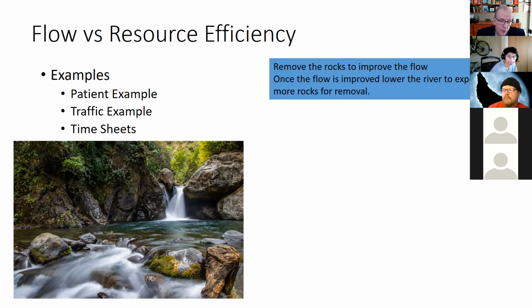That's one of the good things going to Last Planner system: you have the people that know their work and you are trying to engage them and you want them to tell you what is going to slow them down so that you can remove those obstacles so they don't get slowed down. And then because Lean is all about continuous improvement, once you get the rocks out of the way, they have another metaphor, you lower the river. So you lower the river because there's more rocks underneath the surface, and then you keep working at it. So it's a never-ending process, right?